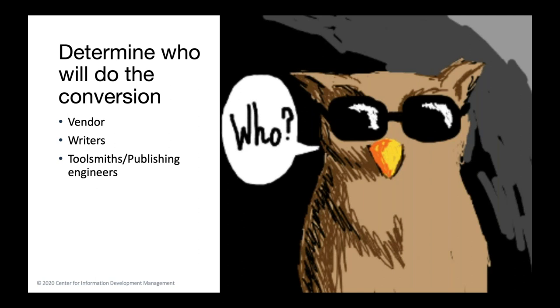So utilizing in-house resources, such as your information architect or even your writers, will require that those resources have an advanced knowledge of DITA, have time to complete the conversion, and have knowledge of the conversion tools. So if you're lucky enough to have toolsmiths, publishing engineers or information engineers or whatever you call them in your organization, and you are able to prioritize having them build a conversion script for you, remember that there are still costs associated with this approach.